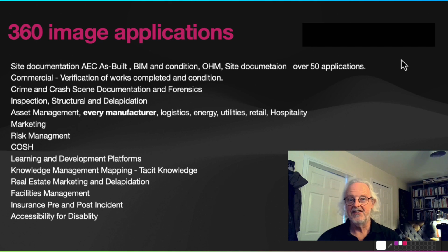By putting 360 imagery of the site, its conditions, access points, loading places, traffic, dilapidation surveys of the environment around, in the tender document, then they've got all the information, and then there's a record of what has actually happened since they started work and when they handed it over. So it's becoming a very important tool in commercial management of projects.